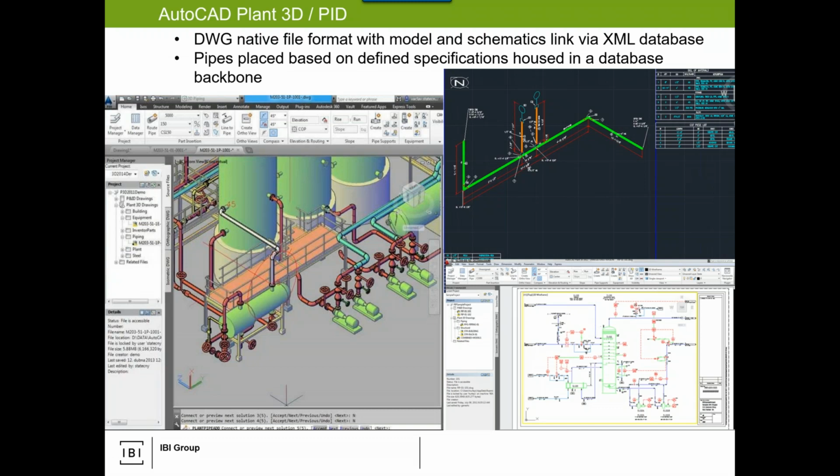So this goes to, am I working on one file or multiple files? Do they all come together? I believe Plant 3D, like Civil 3D, is dabbling in multiple people in a single DWG. But the critical nature here is the division of flow streams. So flows that can be isolated with the proper bill of materials, proper isometric. That top left is handed to a fabricator, and they fabricate. Pipe spools are generated, delivered to site, and away you go.